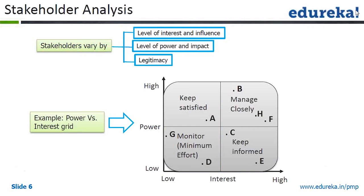Once we identify the stakeholders, we need to analyze them. We look at the levels of interest and influence the stakeholder has, or the level of power and impact, or the legitimacy of the stakeholders. From this analysis, we create a power-interest grid.